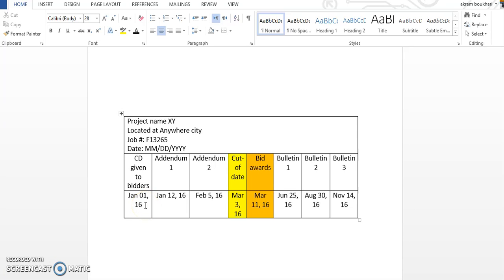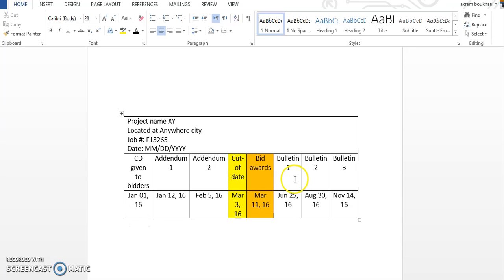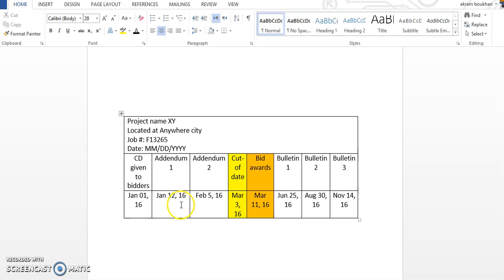And he has to submit his tender or bid pricing on March 11th. So any modification or changes in the specification or the drawings between the date the bid documents are given and the bid award is called addendum. But usually there is a cut-off date, about one week or 10 days, something like this. We cannot issue the contractor any revision after that, otherwise he will be confused.